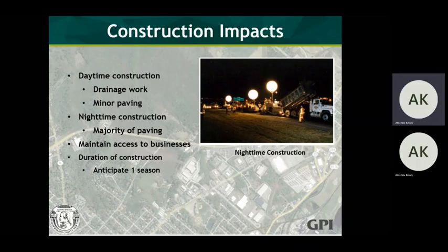During the daytime is the highest time of traffic along Quaker Road. Because of this, we want to limit daytime construction to drainage work and minor paving operations. The majority of the production paving would be completed during nighttime, when there is little traffic along Quaker Road. The contractor will be required to maintain access to businesses throughout construction. The duration of construction is anticipated to be one season.